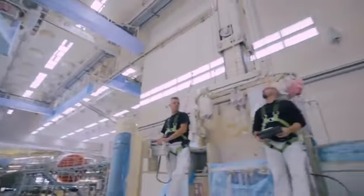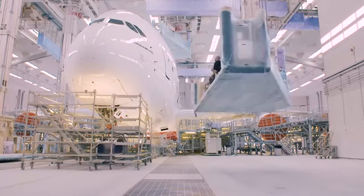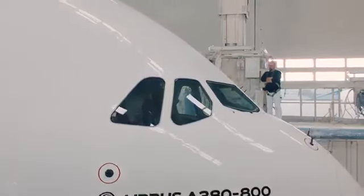Final check is our final quality check before we do the customer acceptance. So what we are looking for is whether there are minor details that need rework, slight inaccuracies in aligning that will be touched up with a brush. We're looking for rests of tape, glue residues from tape that will be cleaned. We're also looking for inclusions or some matte areas that will be polished.